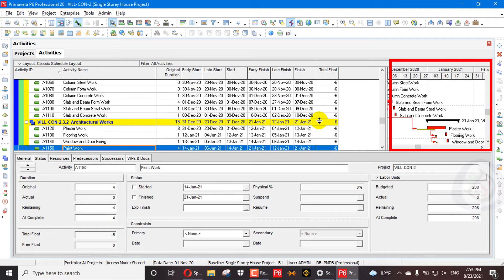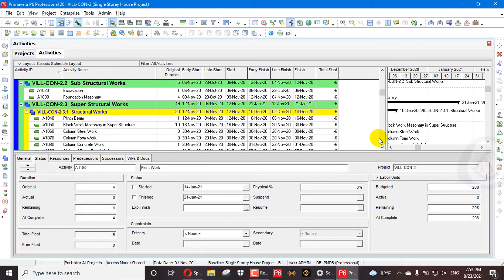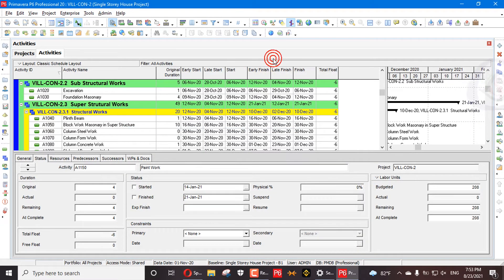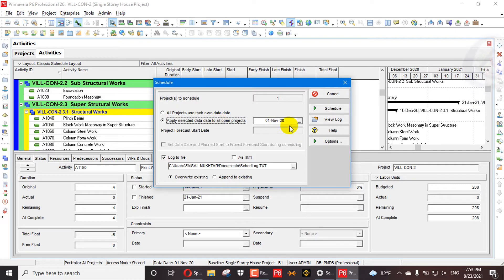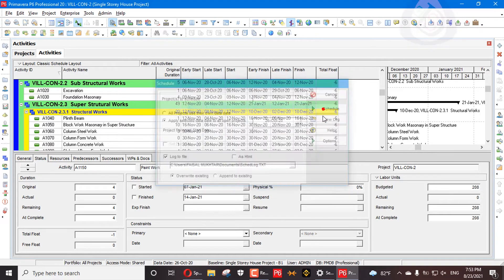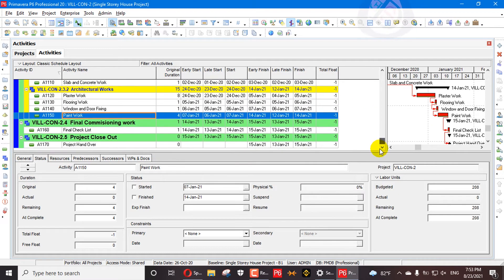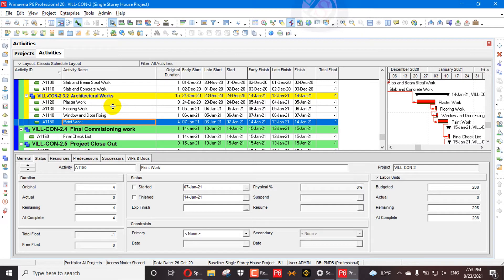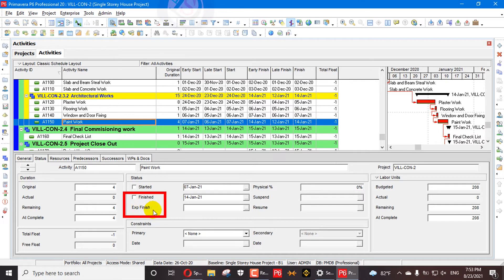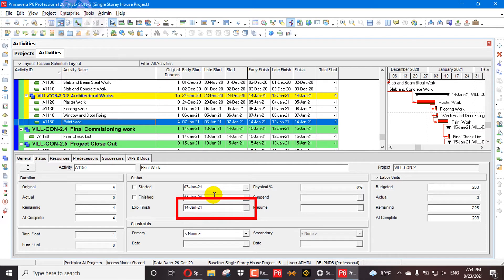So how can you freeze your deadline in the project, and how many activities can you assign to your deadlines? What impact do deadlines have on your schedule? I will schedule it again on 26th of October. First I will see which activity I need to freeze the dates for. If I say my paint work will finish on 14th of January, I go to the Expected Finish field.